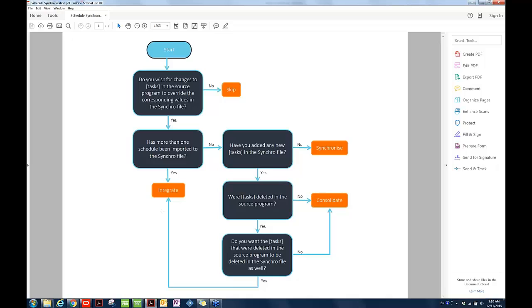The fourth option is Integrate. Integrate is identical to Synchronize. The Integrate option ensures that the associated attributes will be synchronized according to the same rules of synchronization. However, compared with Synchronize option, the changes are targeted only for the data belonging to the selected target project. Data added to the target project from other source project will be left unchanged.